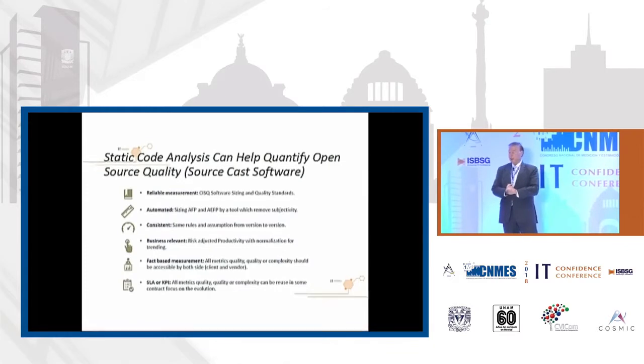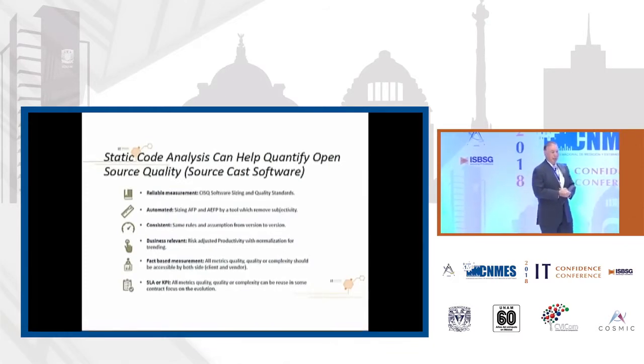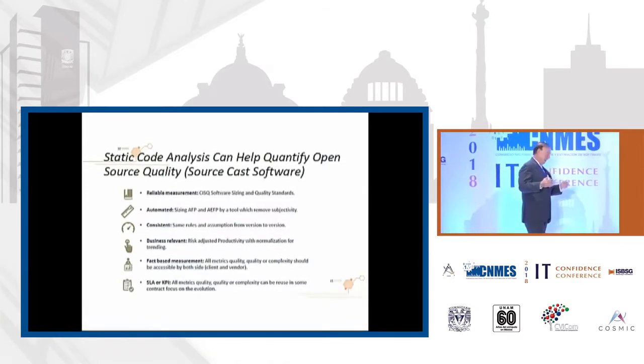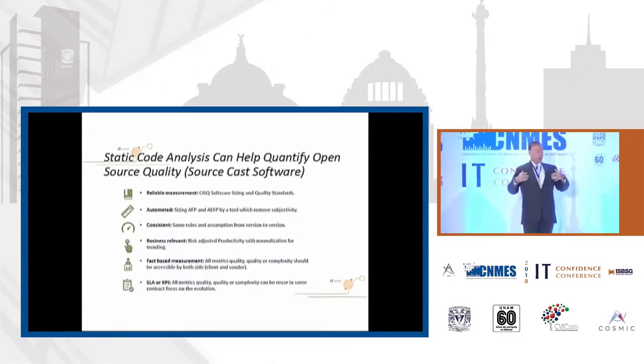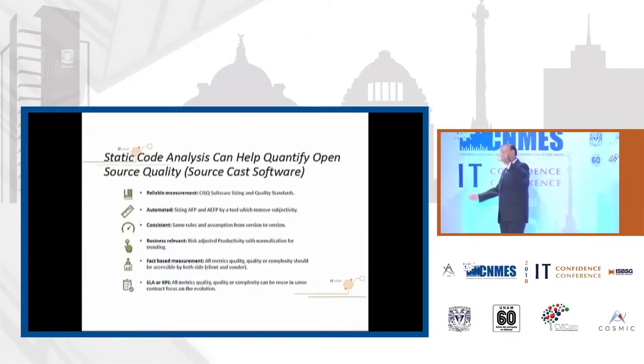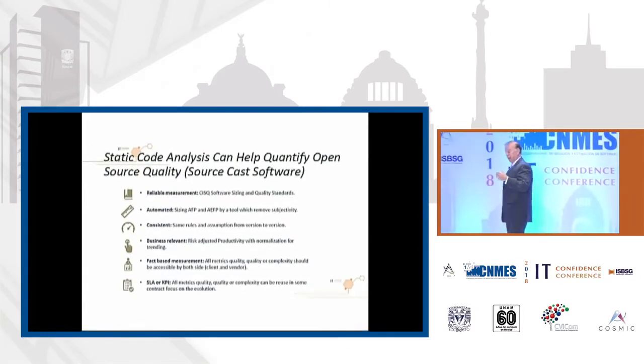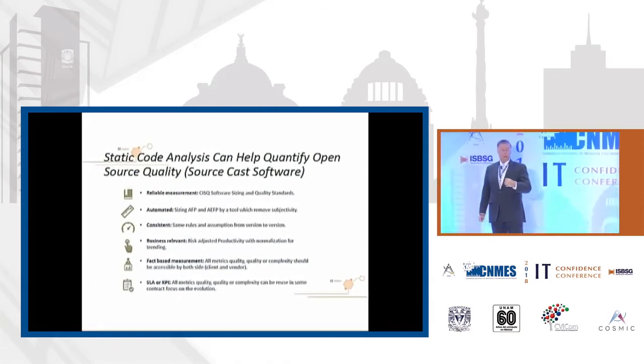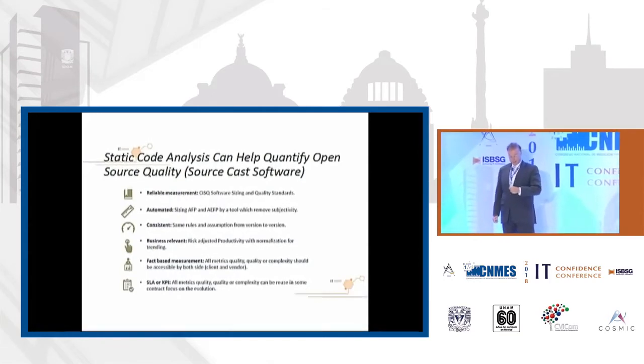So you can run code analysis, find out how good the code is, find out how much code there is. You can estimate with lines of code too. If you're going to change 30% of it, and you know it's 100,000 lines of code, you can make a pretty good estimate of how long it's going to take and how much it's going to cost.